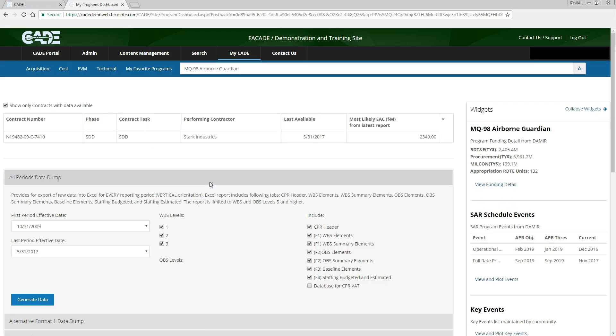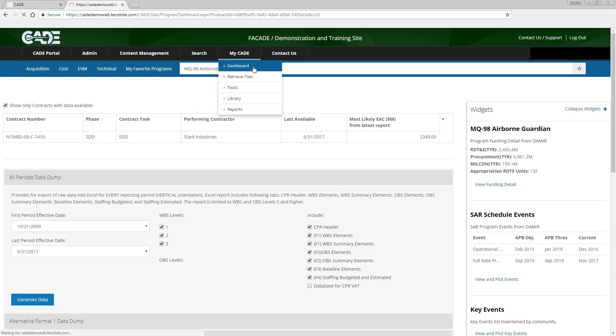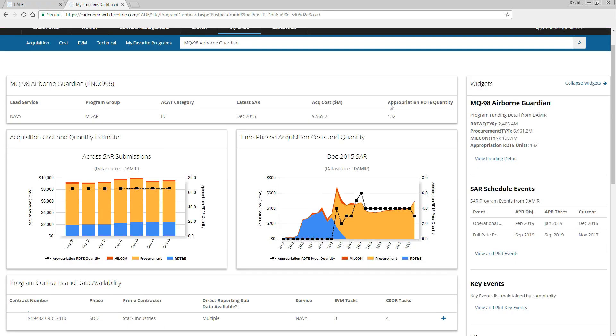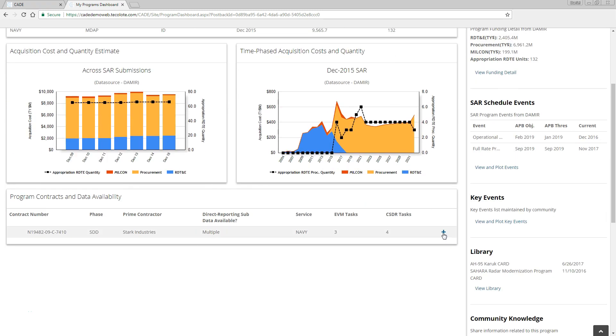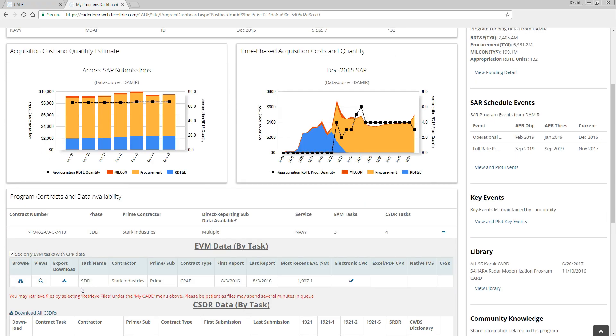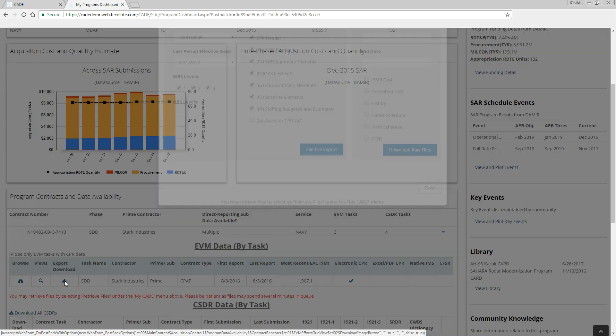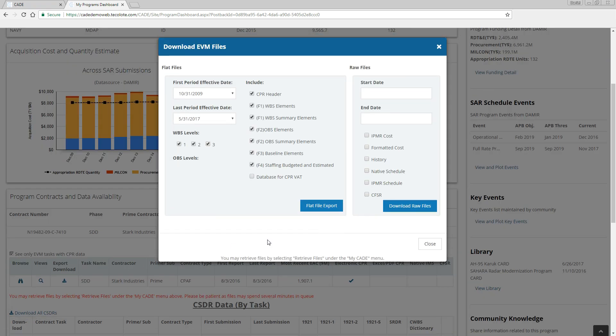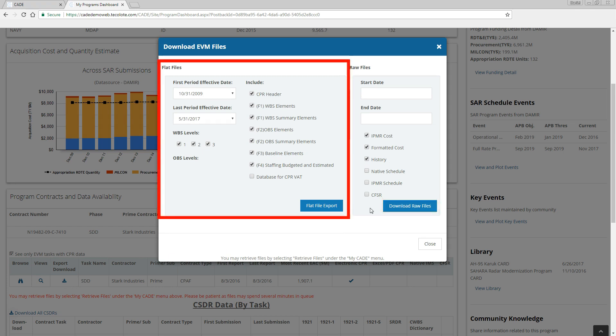Lastly, to export as a raw XML file, we need to return to the dashboard and select the Export Download icon from the desired row of the EVM Data subtable. In the Raw Files section, make the appropriate selections and click the Download Raw Files button to generate a job in the queue. EVM flat files can also be exported from the program dashboard via this pop-up window.